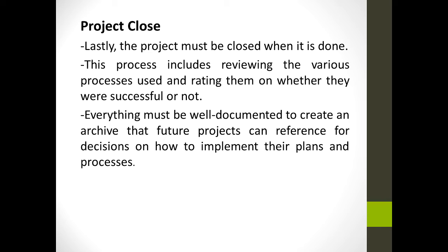Project close. Lastly, the project must be closed when it is done. This process includes reviewing the various processes used and rating them on whether they were successful or not. Everything must be well documented so that future projects can reference it for decisions on how to implement their plans and processes.